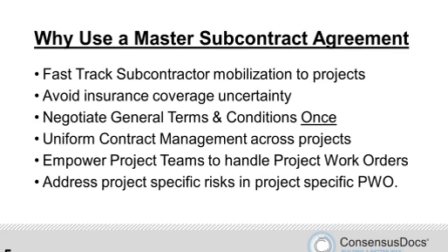And so you don't have to worry about a subcontractor being out on site and you not being a named insured, or an additional insured under their insurance, and not being sure if you've got the coverage. And so you avoid some of those disputes, some of those concerns, and you're able to get subcontractors out onto the job site faster when you understand that all we need to do is finalize the scope and the price and those kind of things.